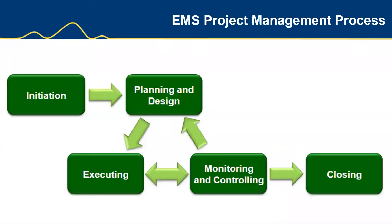Let's look at the four stages of an EMS project management process. Let's say the customer has selected the vendor and a PO is placed. The next stage is to initiate the project. It is critical that the project is managed by a confident and experienced project manager. Once the PO is received, the project has an initiation stage with a kickoff meeting. Then the next phase would focus on planning and system design, then execution and monitoring and control, and finally closing off.